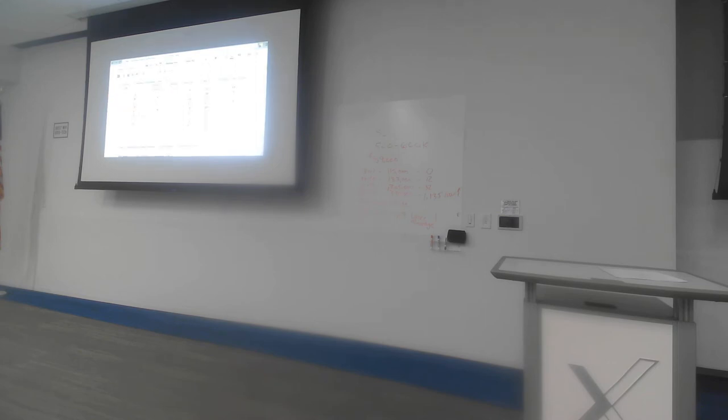So I have to go back again and look at all my different activities, but really only look at the activities that are on the critical path, because they are the ones that are going to make a difference to the overall project duration. So A, C, E, I, and J. If I look at the expedite cost slopes of each one of those, I see that out of those five activities, activity I is the cheapest one. And I have the opportunity to crash I from 3 days down to 2 days. It'll cost me €2 to do that.